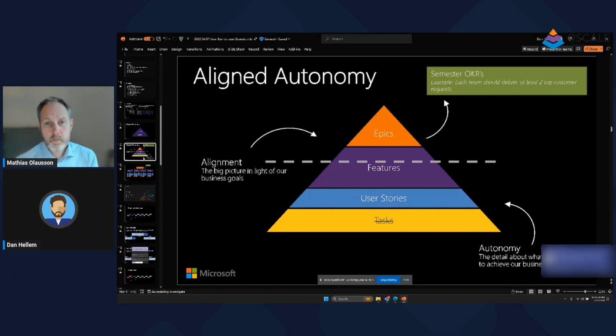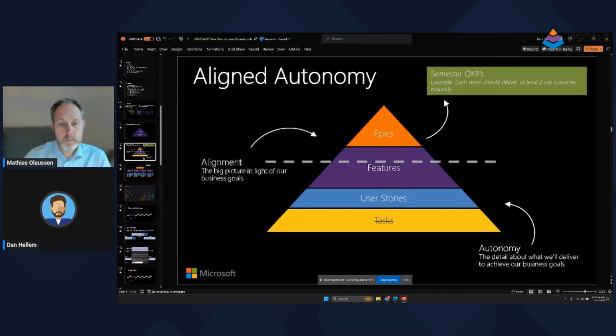Yeah, so we'll typically track that at the feature level, right? So we'll say, hey, this feature kind of depends on that feature that you're working on. But the reality is we don't really need to track dependencies very often, because we just have the conversation with that team. Like, I'll sit with the repos team. We'll understand what you're working on. We'll work on it together. We understand what their timeline is. They understand what our timeline is. So it's less about looking at a bunch of dependencies on a spreadsheet or in the product, and it's really just having a conversation with those different teams as we collaborate with each other.